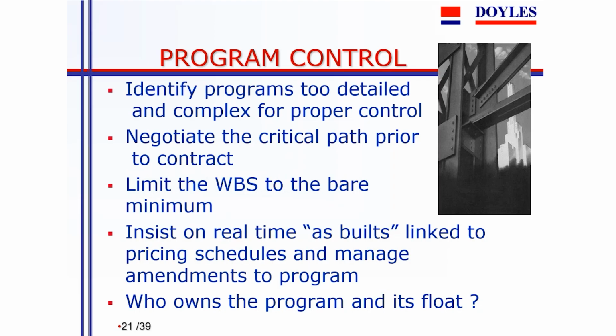So do you have a simple bar chart that says we'll excavate for 6 weeks, we'll then put in the foundations for another 6 weeks, and after that we'll build the building, rather than carefully monitoring and prescribing when and where each particular excavator is on time? So look at that aspect, because time is very important, and time often develops significant disputes between the principal and the contractor. So if you go another slide,